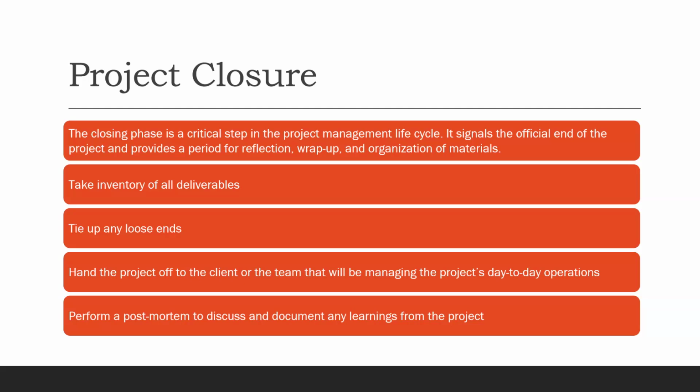The loose ends, people, are so important. In Africa, we love to do things in a careless manner and then loose ends develop. For example, you have done so many trainings, 10 trainings, but you have submitted 6 reports and all the trainings were funded separately. So it means you haven't accounted for the 4 reports. You've got no report on the record. Now in record keeping, we say anything not recorded is as good as not done. And it's a legal issue. So these are loose ends.